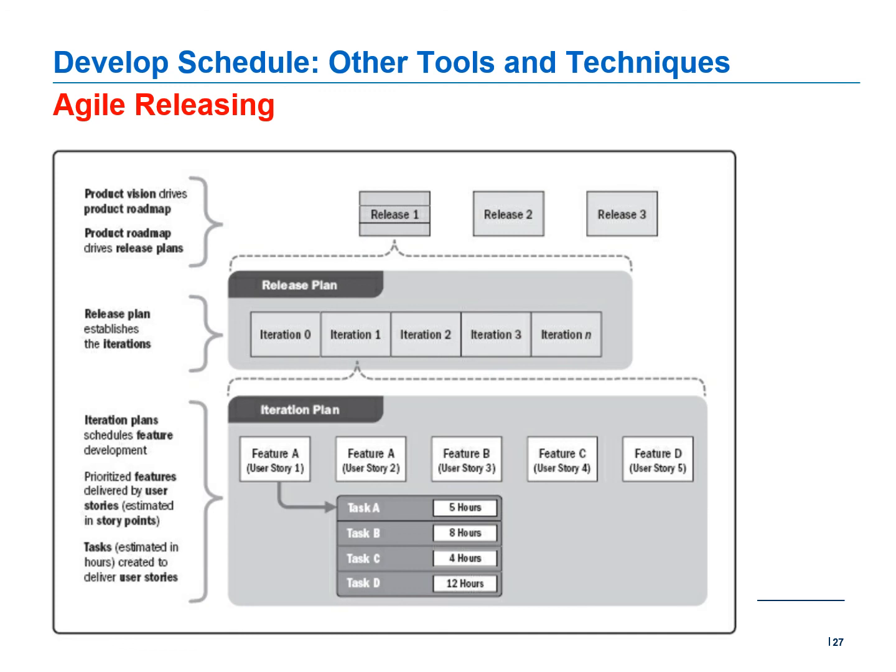Next, what you do is you divide that release into multiple iterations. In this case, we are saying we are going to have 5 iterations starting from iteration 0 goes until iteration 4. And then once the iteration planning is done, you will have a set of priorities lined up and allocated for each and every release.